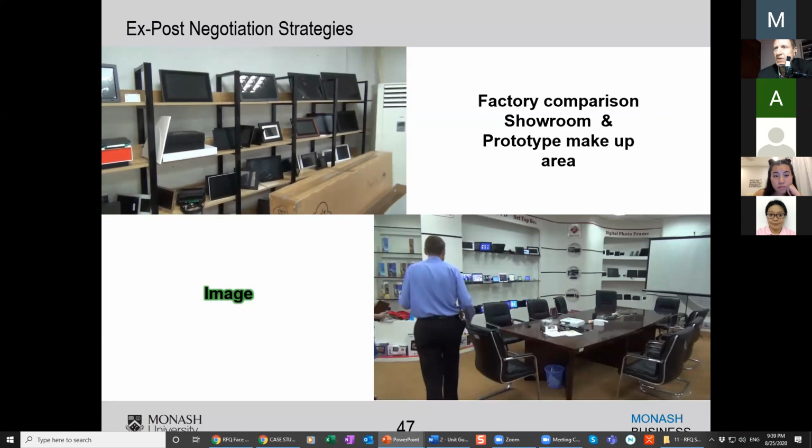They'll inspect a certain quantity of the 2,000 units, say 100 units. What I said is, why don't you pay for 3 days of the inspector? Then that's going to cost you $1,000. You're ordering 2,000, so that's 50 cents per unit. You're with me here, right? So that's $20.50. And now you've got assurance, because the third-party inspector is inspecting 300 units, not just 100 units.